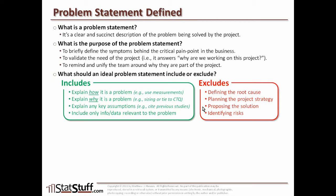A lot of people try to propose a solution in the problem statement. They quickly assume some of the symptoms and lay out what they need to do to solve it. As we've talked about in understanding Lean and Six Sigma, if you already know the solution, you don't need Lean or Six Sigma — you just go implement the solution using normal project management tools. If you're going to define the problem statement, do not include a solution within it. Also, if there are any risks involved, it's important to know and identify them, but don't do it in the problem statement. Let those risks be addressed in a separate notation within the project charter or somewhere else within the project.